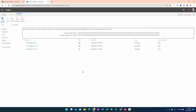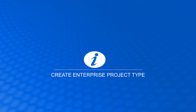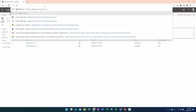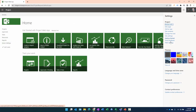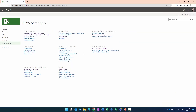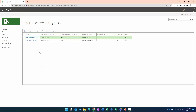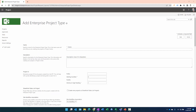We now have the building blocks together to proceed with creating the EPTs. Let's go to Project Web App, then Server Settings — or PWA Settings if server settings isn't on the quick launch. Under Workflow and Project Detail Page Settings, there is 'Enterprise Project Types.' We click on that and select New Enterprise Project Type.